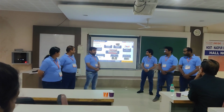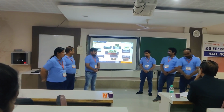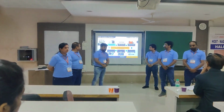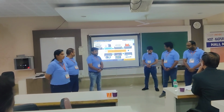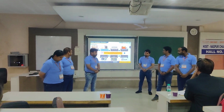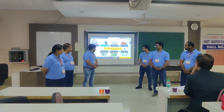We have also understood that cabling activities have a high number of defects, so we felt the need to drill down further. The cable installation workflow is like this. It initiates with the cable anchor installation, followed by root survey and the following processes. We have also analyzed that root survey has a high number of volumes and high number of defects. Hence, it is evident that root survey hold-ups are choking up the entire workflow, and we can also conclude that it is critical to penetration, trials and commissioning.